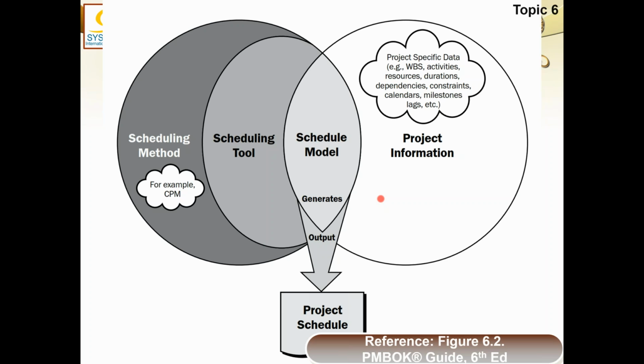Then we will experiment with the instances for what all else can happen, like the risks, which are uncertainties. We will think of all the possible uncertainties, and when we have exhausted all of them, and we have elaborated the scope and the schedule in every possible form, then we will stop creating these instances. The final instance, the final shape which has so evolved, we will put for approval by the project sponsor or the project board.